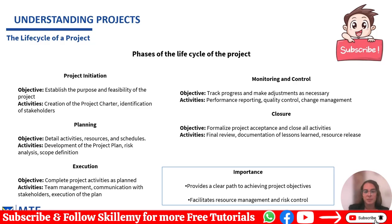In phase 2, the planning, after the project's purpose is clearly defined, we move to the planning phase. This is where we go into detail about how the project will be completed. In this phase, our main goal is to outline the specific activities, the resources, and timelines required. Activities in this phase include developing the project plan, which breaks down the work into smaller tasks, and also allocates resources and sets deadlines. We also conduct a risk analysis to identify the potential issues and plan for them. Additionally, we define the project scope, which establishes the boundaries of the project, ensuring everyone knows what's included and what's not. Good planning is crucial to avoid delays and cost overruns.